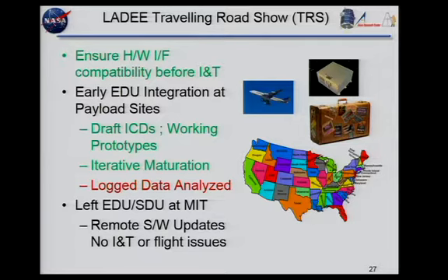There's what I think the data structure is. Somebody else would send me something, when you have something written down, and then I'd code something quickly. They had their thing that they're working on. We'd go out there, plug it in, see where the problems were, fix the problems, and then the ICD now is not what you wrote down. It's the working prototype. Then we'd go back to the document. So now the document matches a working prototype.